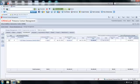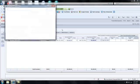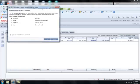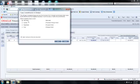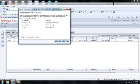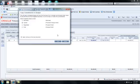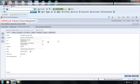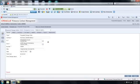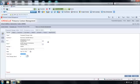So what I'm going to do is click Copy Commitments to Budget, this button over here to the right. When I click there, I'll have a dialog box asking me which of the four workflow phases I would like to start with when I go to the owner. I'm going to say I want to start with the quoted phase. In other words, I'm skipping the estimated phase. And at that point, Contract Manager is going to create a proposed change order. I'm also going to ask Contract Manager to apply a markup to the new document. So I'm ready to click OK. So Contract Management has now created a proposed change order to the customer. Notice on the General tab that the total cost is $5,160, not $4,300. So that's indicative that a markup has been added.